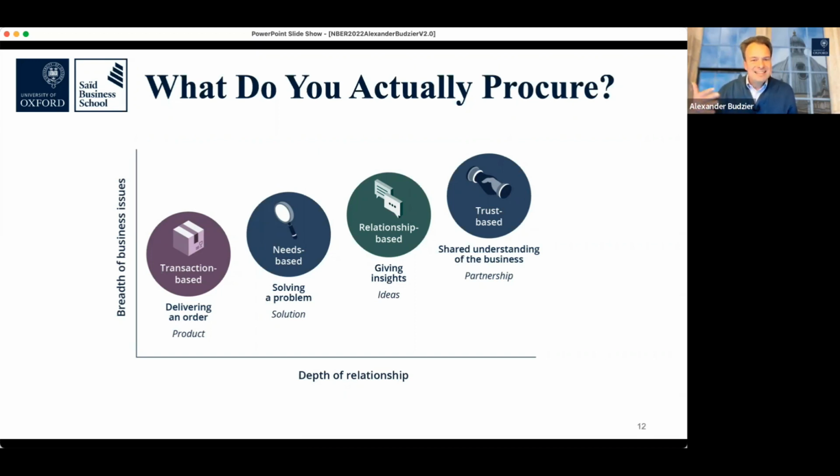Say, for instance, in Australia, I've recently seen, because of doing some work and research there, that a standard part and parcel of a lot of that kind of partnership style alliancing procurement is almost HR assessment center style behavioral interviews, where the leadership of the joint venture, the operational leadership of the future joint venture, needs to come in and go through war games and scenarios.